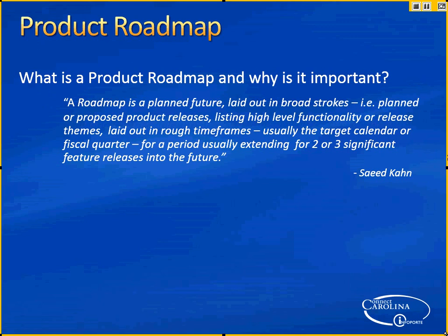The roadmap, a planned future laid out in broad strokes, right? What are going to be the releases, high-level functionality of what we think will be in the releases, rough time frames, usually looking forward at least 2 or 3 releases into the future.